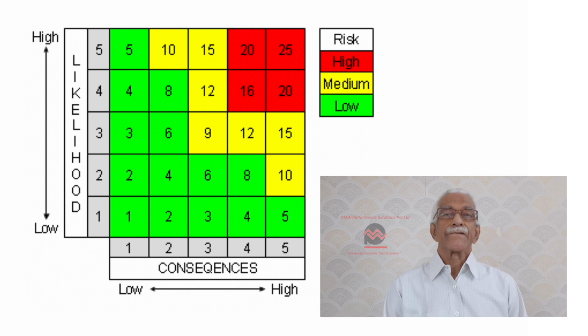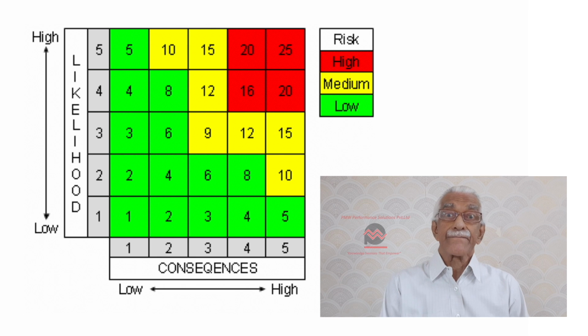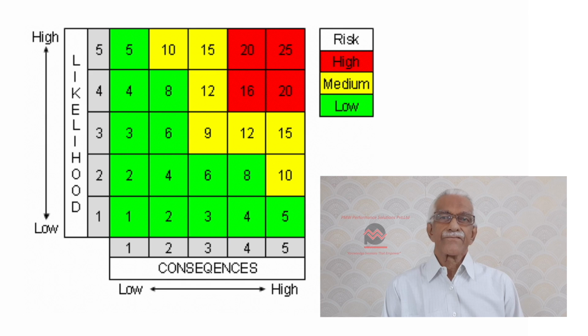From this, we also have to define the probability and impact matrix. For a person who's risk averse, for example, a probability of 7 on the matrix may be very high, but for a risk tolerant person, 7 may not be that high a figure. He or she is willing to accept a higher level of risk.